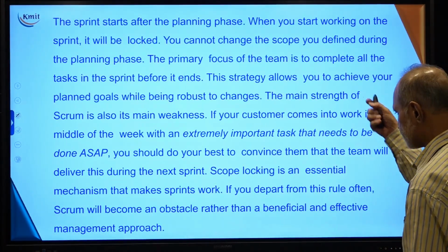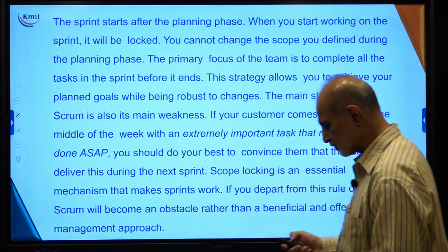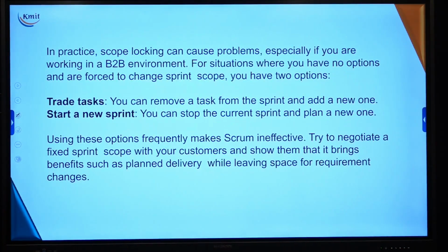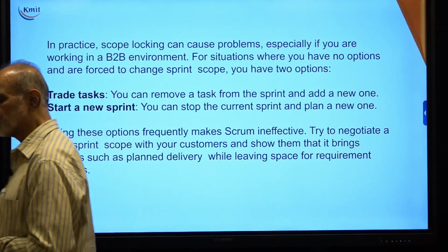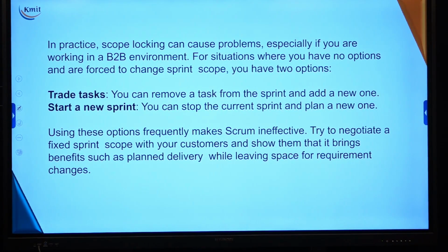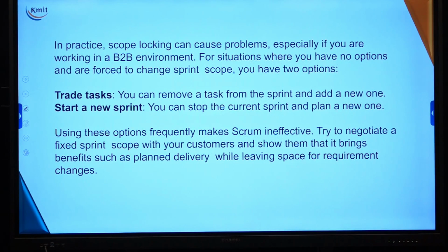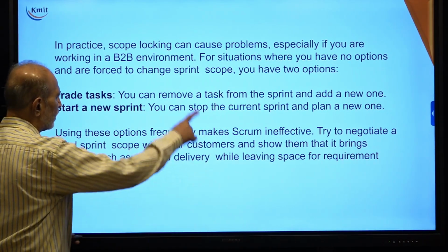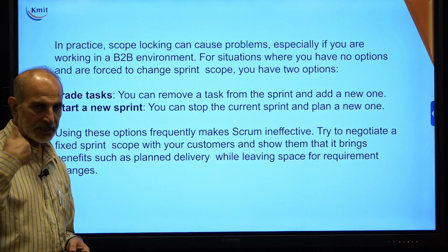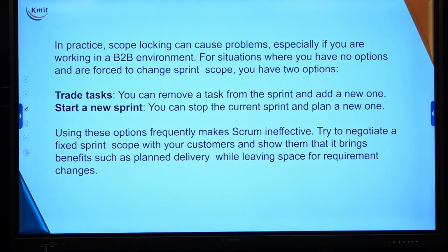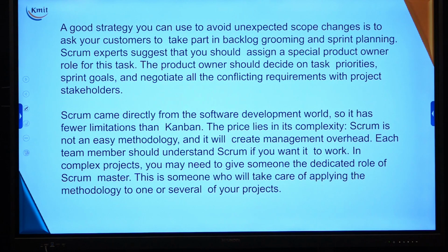Okay, so this is more detail about the sprint. You can go through it, and in practice, this kind of job using the sprint is very good for business-to-business customers, so a B2B environment. For situations where we have no option but are forced to change the sprint scope, we have 2 options. Trade the task, that is, you can move a task from a sprint and add it to another one, or start a new sprint, that is, you can stop the current sprint task and take another one. So these are all the project methodologies which are available, and in our software engineering we have also learned about the software SPM.